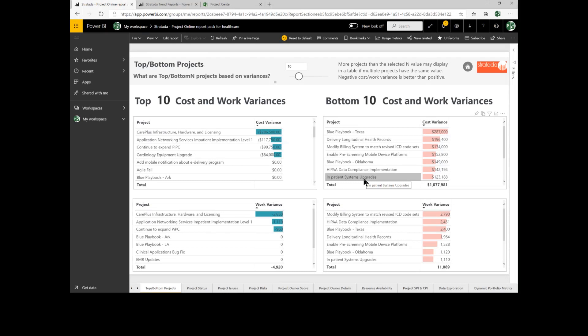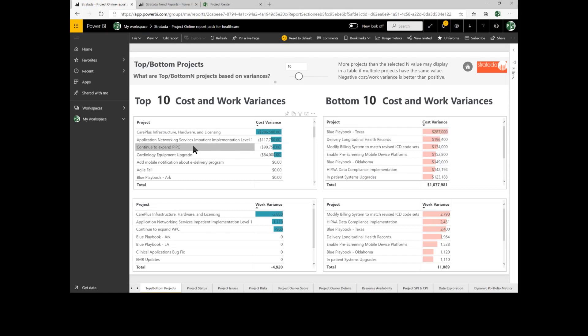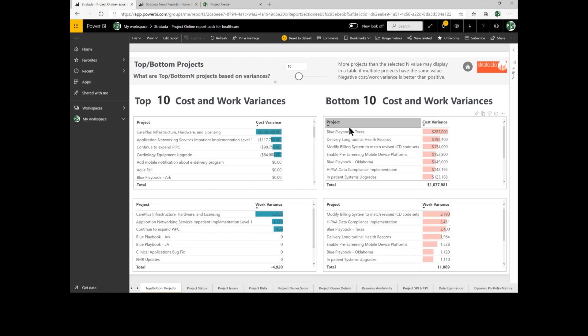If I'm trying to manage my portfolio and I have budget control for the whole portfolio, I can see that the Texas Playbook is currently in need of $287,000 of cost. And over here, I've got an underrun of $286,000 on my CARE Plus project. As a portfolio manager, I can start to move money around between projects to balance my portfolio.